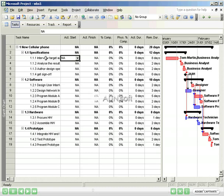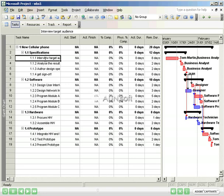Task Interview Target Audience was scheduled to start on January 6th and complete on January 15th. Suppose it did not start until January 13th. We can record the actual start date in the Actual Start Date field.